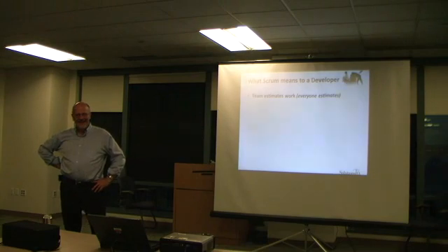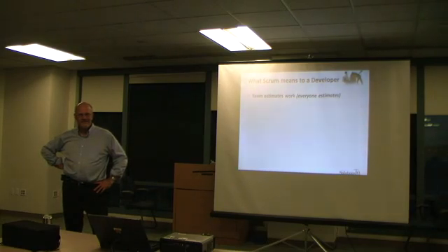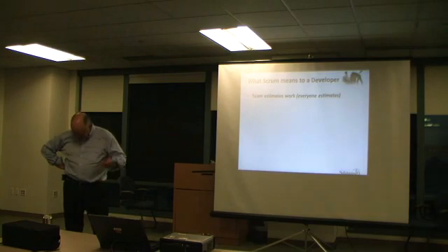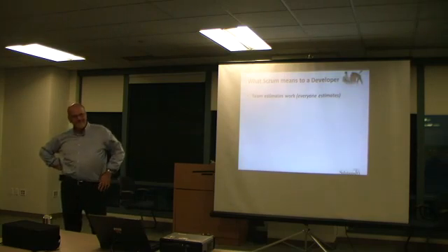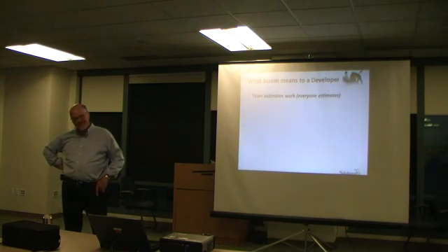One of the best estimating stories I ever heard was a friend of mine, based on his experience working at this particular company for 7 or 10 years, said, you know, I've come up with my method of estimating. He was up in Canada. For every 1,000 kilometers between me and the customer, add 2 weeks. For every person on the team over 4, add 2 weeks. You know, he never at any point talked about the feature set. Right. He talked about all the things that get in the way of delivering functionality. Yeah, good point. And then he applied it to his years of experience and found that he was within about 20% error bars. You gotta love cultural knowledge.